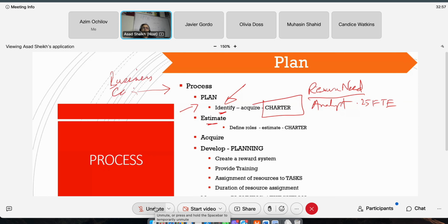The business case document was created first and put together to initiate this project, and they did some analysis and they said, hey, we need X, Y, and Z resources. In completing this business case, the sponsor met with the resource managers and said, for this particular project that we're trying to complete, what do you think we need? And so these resource managers were looking at their list of resources and said, I have 4 or 5, and each may have a couple of other projects in which their resources are assigned. They look and see, okay, I got 1 or 2 available. Let's assign these 2 to this project.